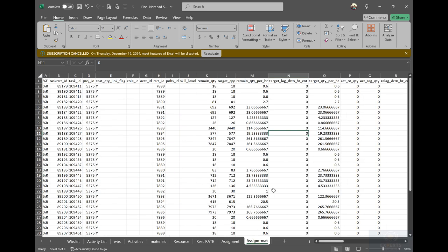After that we will do the same operation for equipment if we have it, and I will do the same equations for the material. But you have to take care about how to get this, because the arrangement is a little bit tricky. That's why I separate the assignment of material and the assignment of labor; everything is separate. Always use VLOOKUP and the functions from Excel to get all the codes, everything. Make the guide first. This guide is your resource ID, and this one will be from the material itself.